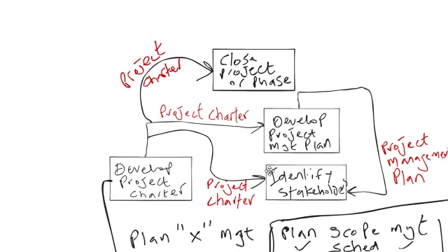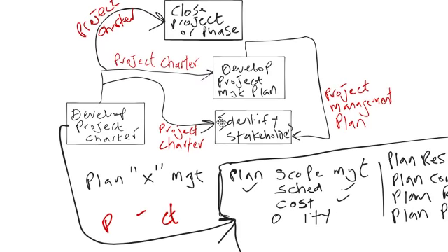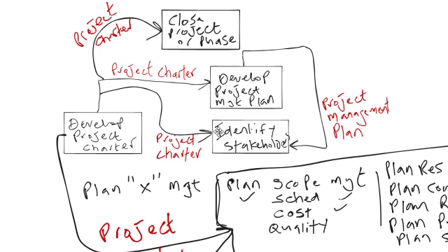These are core relationships. Now, like I said earlier, we also have the project charter going into processes of scope management because the project charter contains your high-level scope. Some of your high-level deliverable description information could actually be in the charter. So another key relationship that I would like you to get straight is the way the project charter goes into processes of scope.